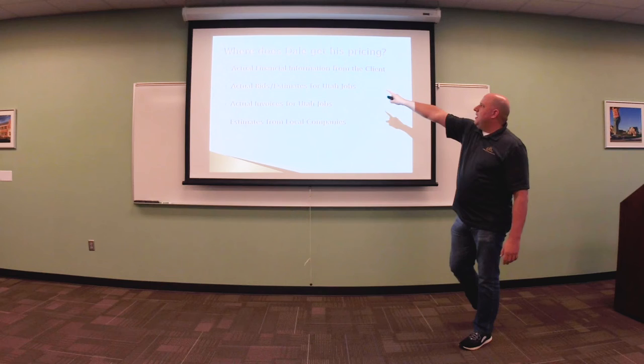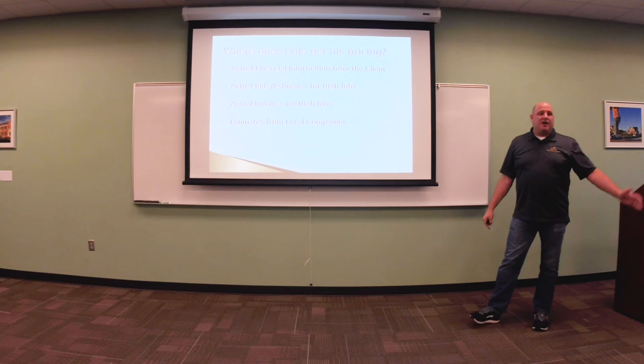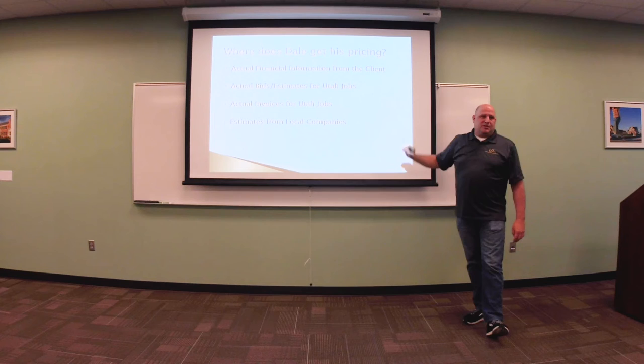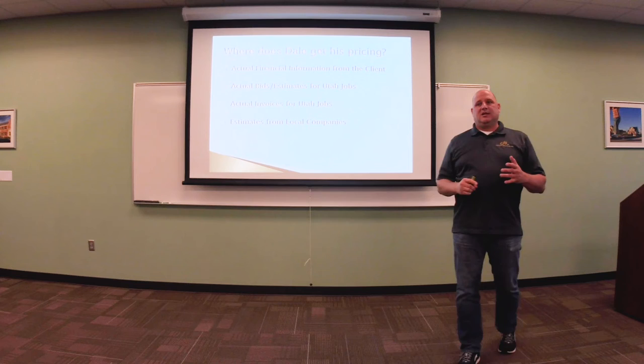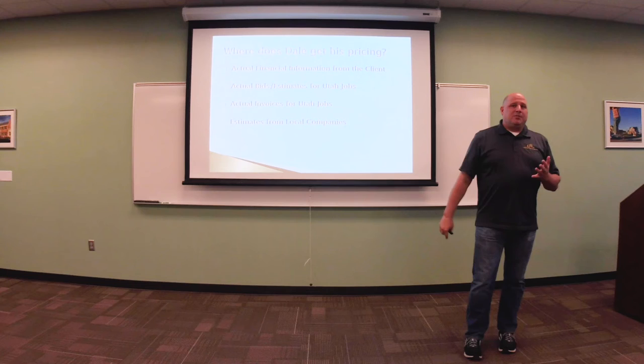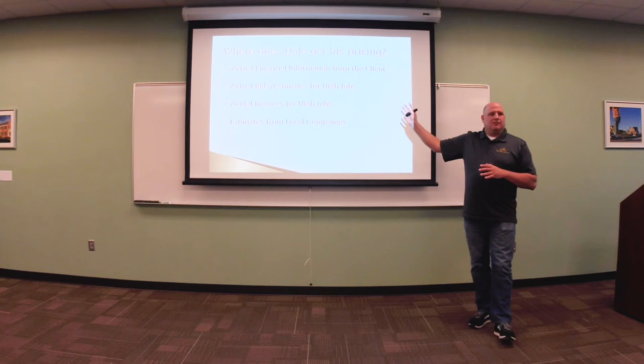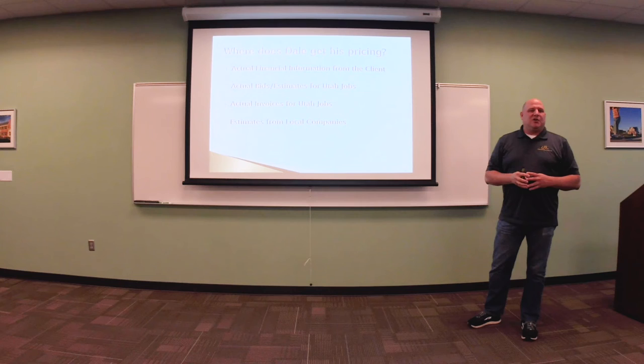Now, a lot of times with a new community, we don't have any information yet, but I have other clients who have actually just done these things. And so we use actual bids and estimates for Utah jobs. We use actual invoices for Utah jobs, and we use estimates from local companies. I work with a lot of clients. People have just replaced their roofs, painted their doors, painted their buildings, replastered their pool, they've just done all these things, and I have all that information. I use that information for other communities. That's where we get information: the actual money people are spending on the ground in Utah, not what they're spending on the ground in California adjusted to what they think the Utah cost variation is.